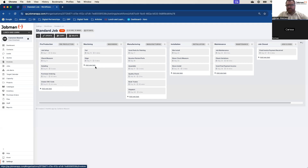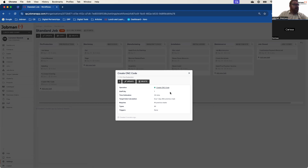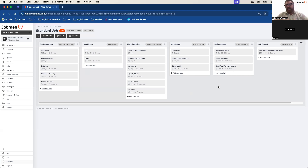Then within statuses, we have operations. My example from before is 'create CNC code' — that's the operation. I have a team member who does that, and as part of my quoting I include an allowance time to cover that for production. Inside your workflows, you'll create some estimated times. These are not massively important — they're there so that if I want to test the system I've got some average times in there. If you have a business that does a lot of repetitive work and you know those times really well, you can put those in the workflow and every time you use it those times will be correct.